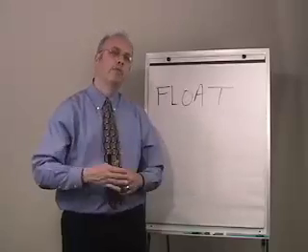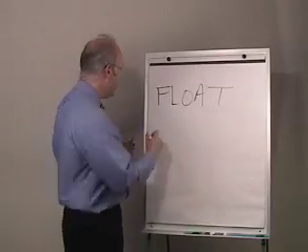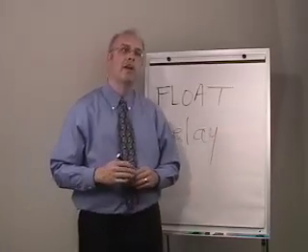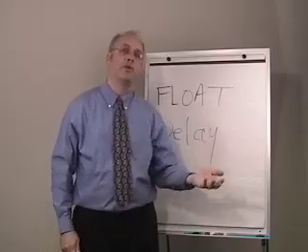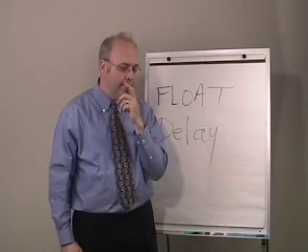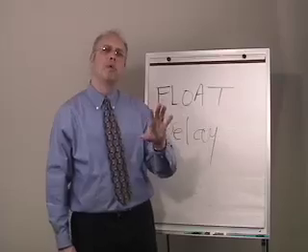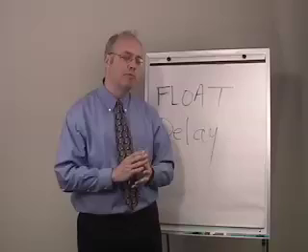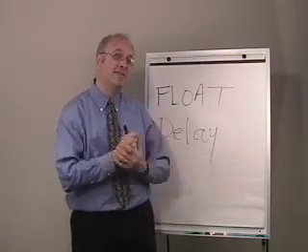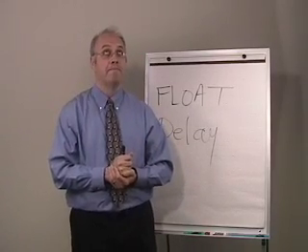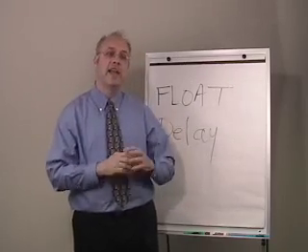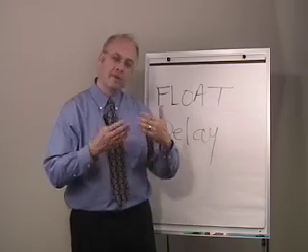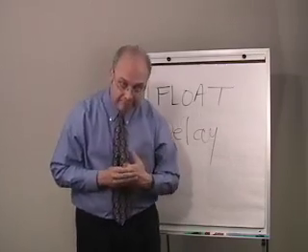Float is also relevant when we start talking about the subject of delay. Because as I said before, the only way to delay a project is along a critical path. So essentially, when we're talking about delay to a project completion date or intermediate milestone, but we're going to focus on project completion dates, I'm essentially saying that there's no float available to that activity, and its delay is pushing out the project completion date. But I'm also saying the activity really doesn't have any float.